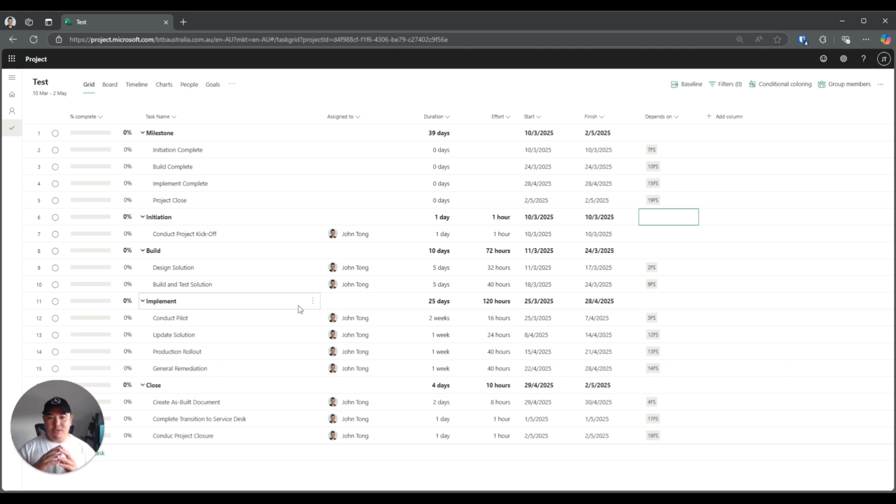and therefore any changes that you make that don't quite look right, particularly if you know that certain phases should be finished in a certain time because of very specific commitments, at least visually you can see it right there and then that something's moved, and then you can go back to start to adjust your plan so that it is in alignment with everybody's expectations or your project goals. So that is why I generally have a section specifically for milestones at the very top, and then for everything else I'll start to build it at the bottom.